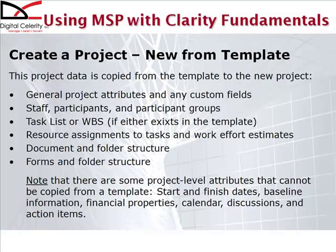Note that some project level information or attributes cannot be copied from a template: start and finish dates, baseline information of course, financial properties, calendars, any discussions or action items that are associated with that project.